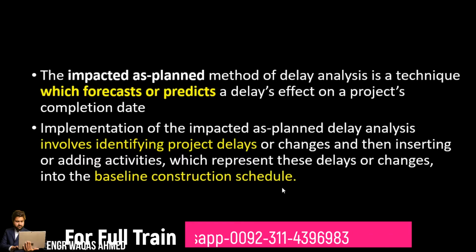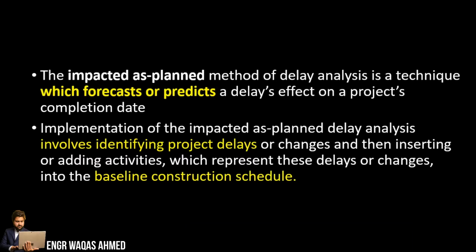I hope you know very well where it comes from. And the second thing: all the correspondence, all the contemporaneous records, site records, showing what the delays were and when they happened, with respect to the chronology of those delays. I will explain each and everything. So you require these two things to run this methodology successfully.